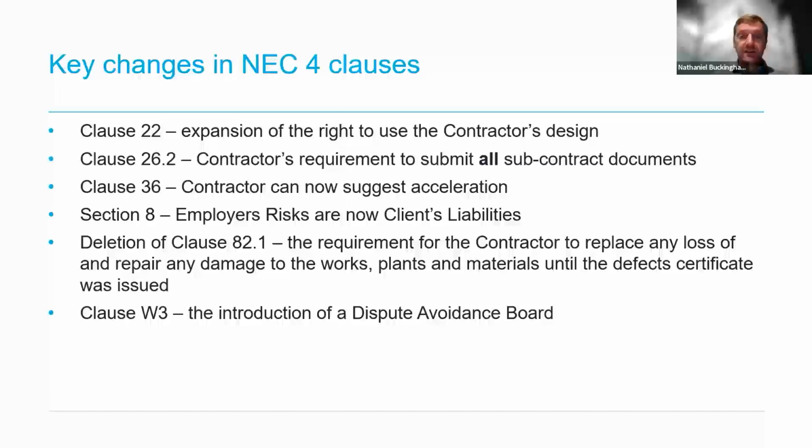In clause 36, the ability to propose acceleration is now available to both the contractor as well as the project manager, and the process leads to quotations and agreement to accelerate if acceptable.